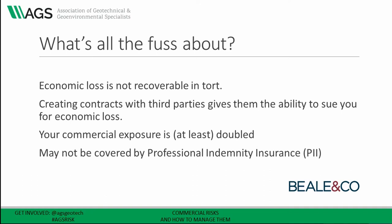What is all the fuss about and why are we talking about collateral warranties and other methods of assignment? Why are they important? Well, as a matter of law, most losses that occur in relation to construction projects — for example, losses caused by delay, interruption, cost of redesign etc. — are classified as economic loss, and those losses are not recoverable in tort. This means that unless you have entered into a contract with the party who suffered that loss, they cannot recover those losses from you.